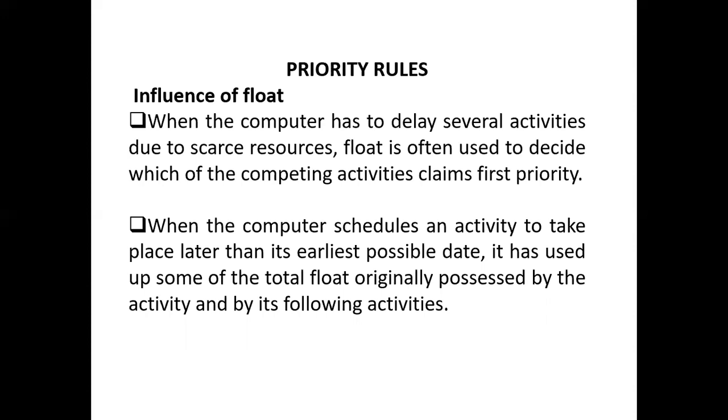So when the computer has to delay an activity due to scarce resources, float is often used to decide which of the competing activities claims first priority. When the computer schedules an activity to take place later than its earliest possible date, it has used up some of the total float originally shared by the activity and its following activity.